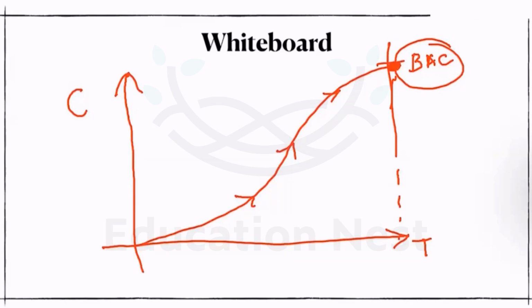So what happens here is the latest trends I'm talking about. Here, this is a budget, right? This is not the actual cost. So actual cost will be something like this, more than the budget. And the earned value, the EVM that we talked about, EVM is earned value management. So the EV here, the earned value, that is much less than the budget. Earned value is nothing but the total work done.